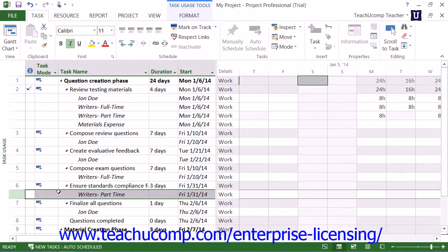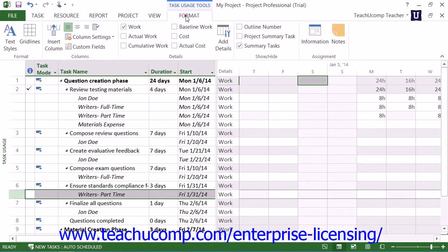Once you've done that, click the Information button that appears in the Assignment button group on the Task Usage Tools contextual tab within the ribbon to open the Assignment Information dialog box.